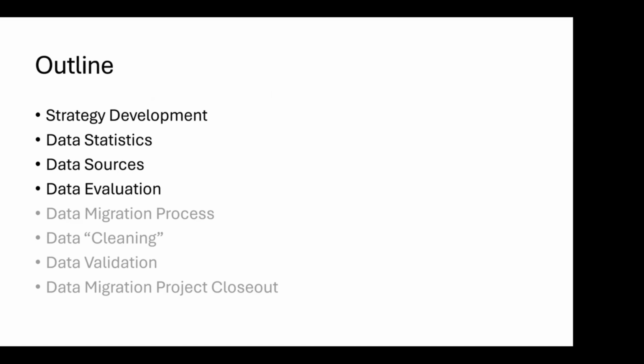When organizations are doing a data migration, we're primarily going to be talking about medical imaging migration, but we'll also touch on things like reports and conversion of data from proprietary to standards. What I often tell people who are about to embark on this is that you need to expect that some of the data that you've been storing may not be able to be migrated. Either there's a problem with the structure of the data, it's corrupt, or it was never valid in the first place. If you take the time to look at the data, you're also going to find a lot of things you didn't expect: missing attributes, incorrect attributes, patients that didn't merge, those kinds of things. So we're going to talk a lot about that.